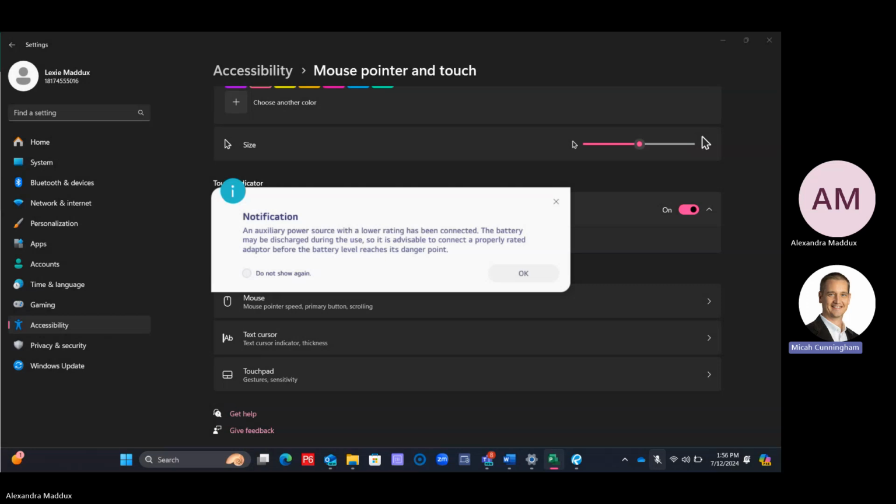So say that your form slab only took 2 days instead of 4 days. So I'm going to type in a 2 there. Now you already missed your start date of rebar because now it's earlier. Does everyone see how it just went earlier? So form slab was supposed to be 4 days, and you were going to start and overlap those. But when it only took 2, now you've missed your start date already. So that's like a backwards logic, like backwards tracing.